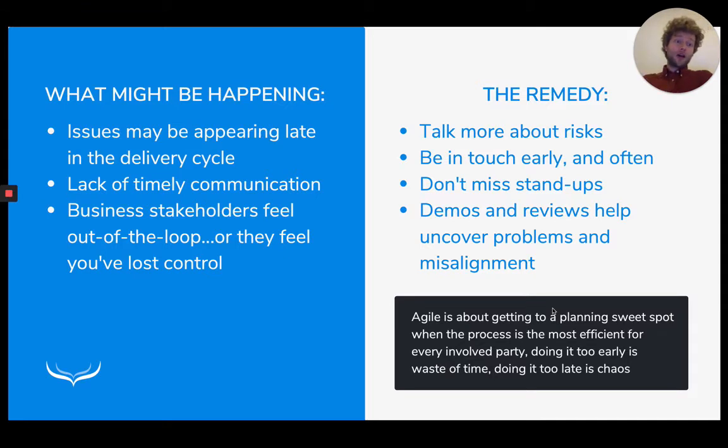So you may have a story coming from one business stakeholder who is pretty confident it's a good story. Then you discuss that with your support team, and they may tell you, okay, but watch out because it may impact some usage for specific users. Or, one particular piece of advice: avoid asking your development team if there are any risks related to a certain story, but ask them what the risks are, because there are probably risks everywhere. Some are more probable or severe, others are less important, but we probably want to learn about all of them if possible.